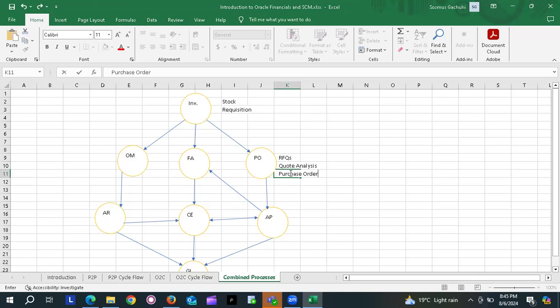You will raise a purchase order, and the abbreviation, this one we said we call it PO, and you might find it being referred to as LPO in our localities. Then once the purchase order has been placed, it has to be approved. Remember, this is a legal document. Once it has been approved, it is issued to the supplier, and the supplier will deliver goods on our premise.